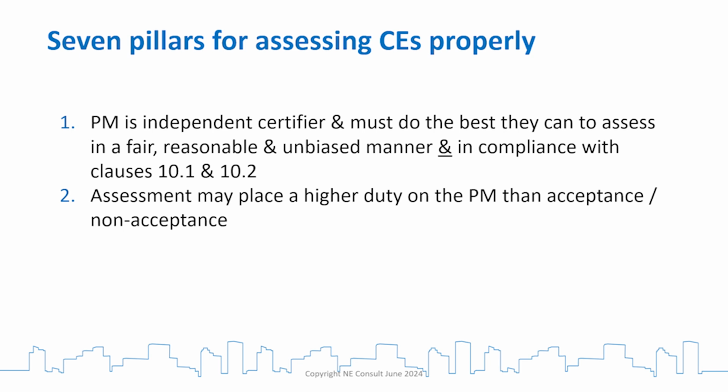So I had an adjudication that informed me a couple of years ago on this, where the project manager had not assessed an extension of time for a compensation event that increased the contract value by 50%. And in adjudication, when questioned why, the project manager said the contractor didn't ask for one. Was the project manager right? We got our extension of time.